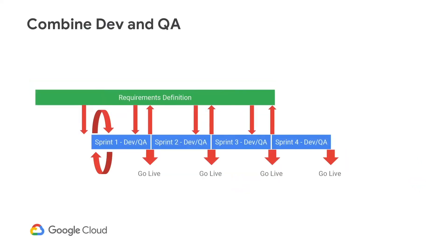The first important tactic to avoid scrum fall is to merge development and QA into one sprint. This likely means you will take on less work in the sprint to give time for bug fixing. But with testing and fixing merged into the sprint, you have tested and ready-to-release functionality at the end of each sprint. This gives us the real ability to pivot. Make this your first goal for the team.